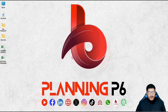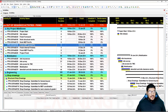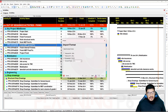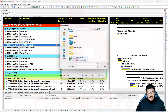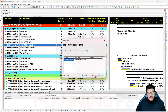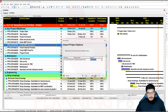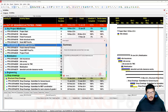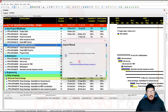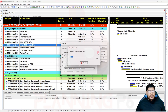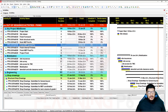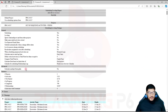After closing, I will go to Primavera and import the relationship again. File > Import > XLS. Click Next, find the file on the desktop, select it and click Open. Click Next, then choose 'Update the existing project.' Select our project, then Activity Relationship. Click Finish. The file is now importing into our project. Import is successful — close it. Now I will run the schedule again and see the difference. It is running — go to the log.